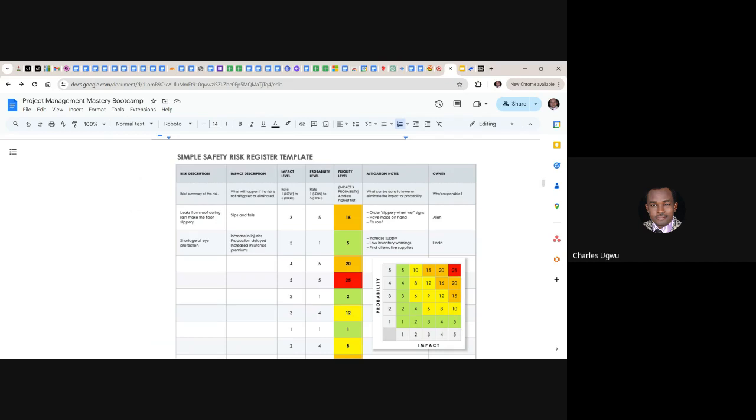When you are planning risk, reviewing risk or assessing risk, you don't do it in isolation. You have your team members. So it's a brainstorming activity where the team will brainstorm and say, okay, after the analysis, the impact level or the rate is 3. You have to give it a rating after brainstorming.